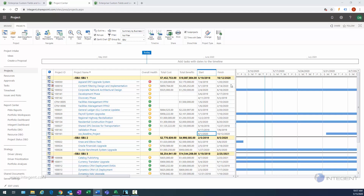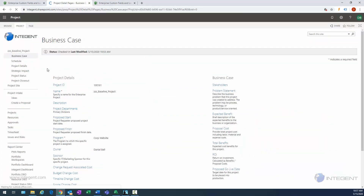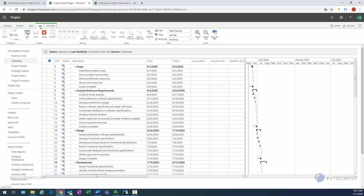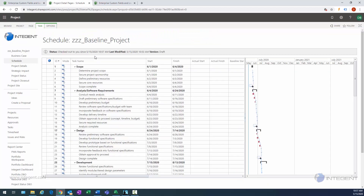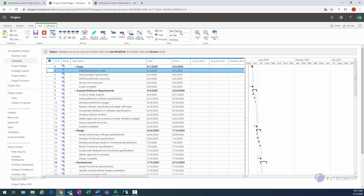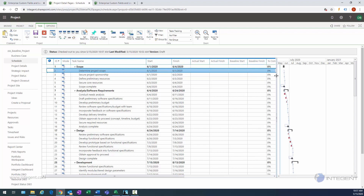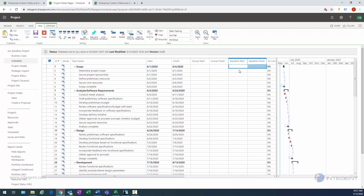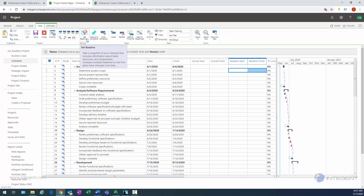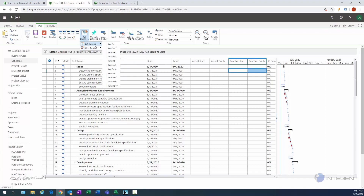Looking at the screen now, we're in the web. I'm going to open up my baseline project by clicking right on the name, then navigate to my schedule. Once we get to the schedule, we're going to check it out in the browser and look at saving a baseline. First, I'm going to move that divider bar over so you can now see that my baseline fields are currently empty because we haven't saved a baseline yet. To save one, on the task ribbon in the editing section there's a Set Baseline button.